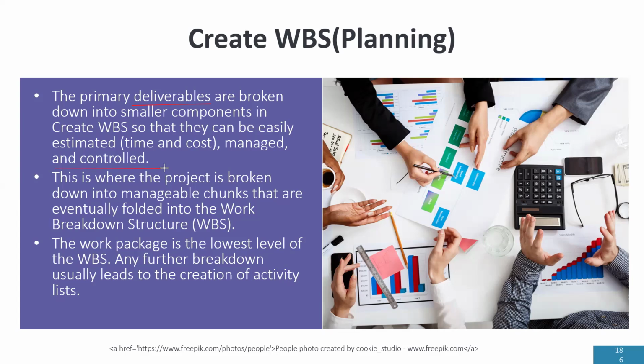Now, there's something about project management that we need to know. In order to manage very large projects, we break it down, right? And that's what the work breakdown structure is. It helps you to break large projects, even large complex projects, into smaller work packages. And what we call work packages is that the work is small enough to be estimated.